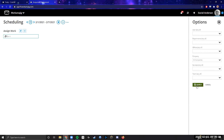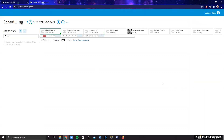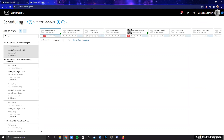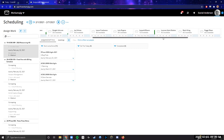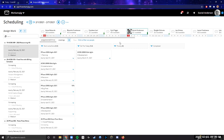When you search this screen, it shows all your users from left to right, alphabetized by default. There's a slider underneath all the names to get back and forth between agency members. If you click on any one specific person, it pulls open the details of tasks assigned to them. The default columns are 'Work to Be Done,' 'Do This Today,' and 'Completed.' I've added a 'Priority One' as well, which I'll show you how to adjust. Underneath each user's name, you'll see the number of hours allocated per day — Monday to Friday — and a green bar on the right that fills up as more hours are assigned, turning yellow around 35 hours and then red beyond that.